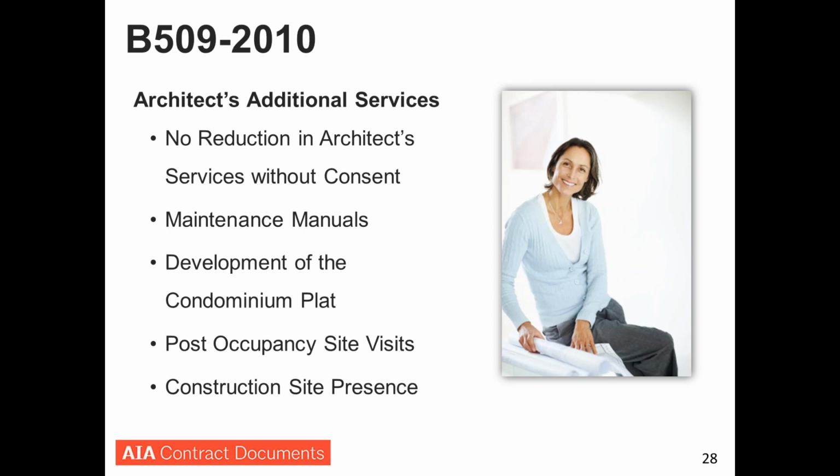It was pretty common when the market was really robust in condominium construction to sign up for a full services agreement, and once you get to the end of CDs, terminate for convenience, which the contract generally allows you to do. And we all know that construction administration, and the activities we undertake in that phase of the work, whether or not they are required in your jurisdiction to actually be provided, and in some they are, are our best protection against claims. You're there, you can see the work go in, you see the shortcuts or the flaws if there are some, and you're able to remedy them before they become extraordinarily expensive to do so.